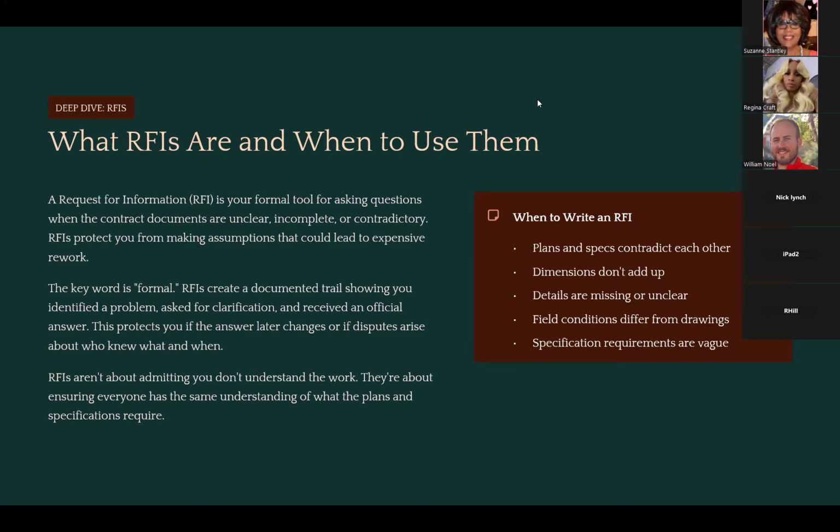And once that gets approved, then you can go, oh, and I already bought the other ones. So you have to pay for those as well, because it's not your fault that the documents changed. So the owner is going to pay for all that material, and hey, here's the other four. They're going to be spares for you.